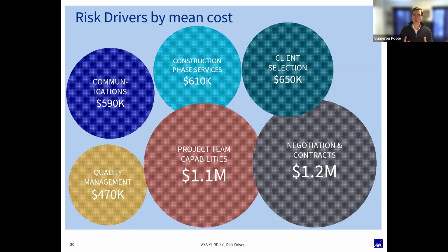And so you want to have a waiver of consequential damages in your contract that says you will not be on the hook for those consequential damages. It's a standard waiver in AIA agreements. In the B101, it's 8.1.3, but it's in all the AIA agreements, and it's something you should be able to get across in your agreements, because in practice, what we see is claims with consequential damages end up being far more severe in terms of the overall cost.